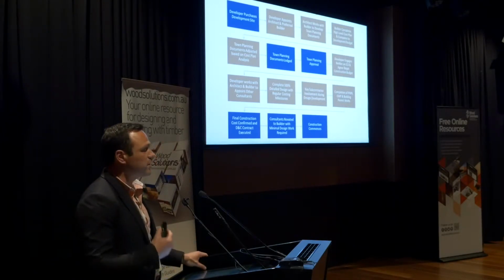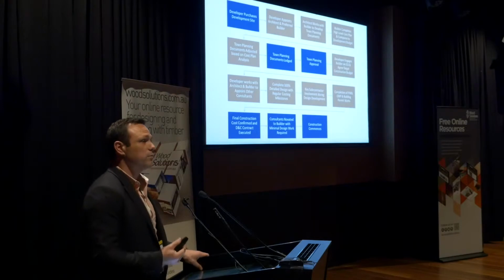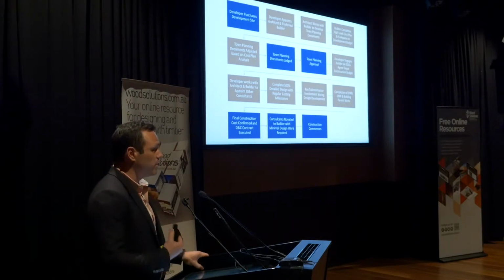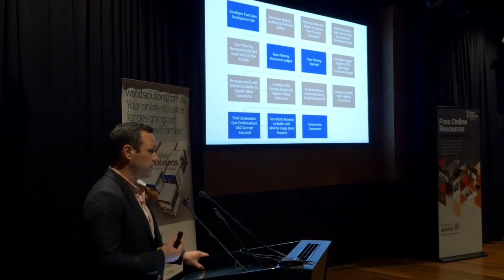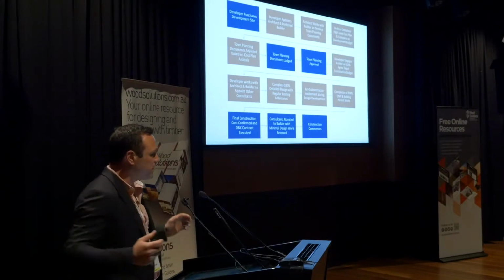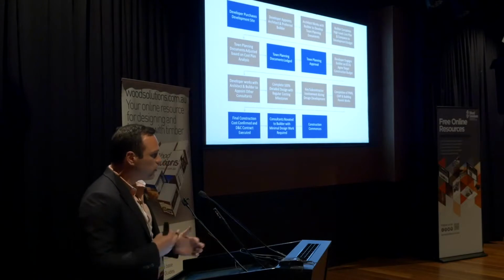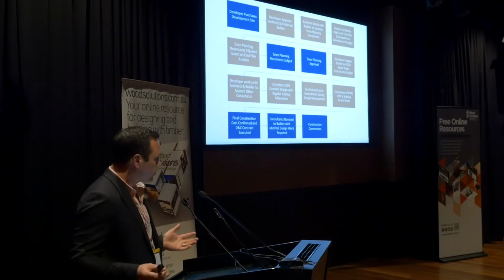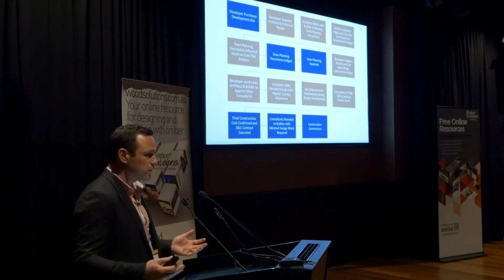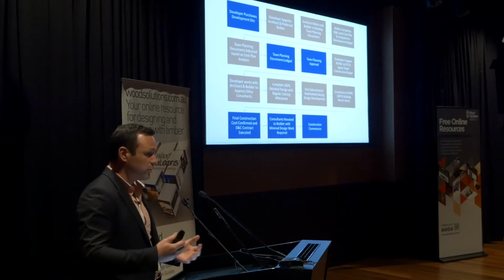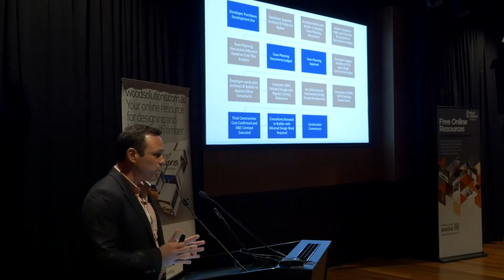And the other key point is key subbies and suppliers get involved. We are starting to develop ECI agreements with our subbies and our suppliers. So what we're doing is we're getting rid of this tender matrix. We might tender it out to 3 or 4, say it's CLT, go and speak to 3 suppliers, let's talk to them, where you at, can you do it, can't you do it, where's the price at, and then you pick one.